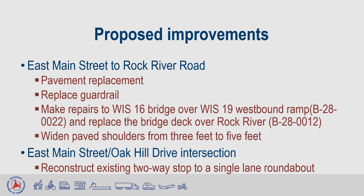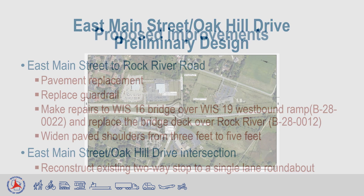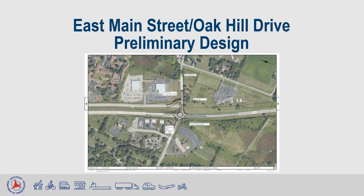The reconstruction project will reconstruct the existing intersection of East Main Street, Oak Hill Road, and Wisconsin 16 to a single-lane roundabout. This slide depicts the preliminary design of the single-lane roundabout presented at the public involvement meeting in July of 2022. Based on public input, our design team reconfigured the roundabout to direct the east leg of the roundabout to the Frontage Road and relocate the intersection of the Frontage Road and Oak Hill Drive to the east leg of the roundabout, which you will see on the next slide.